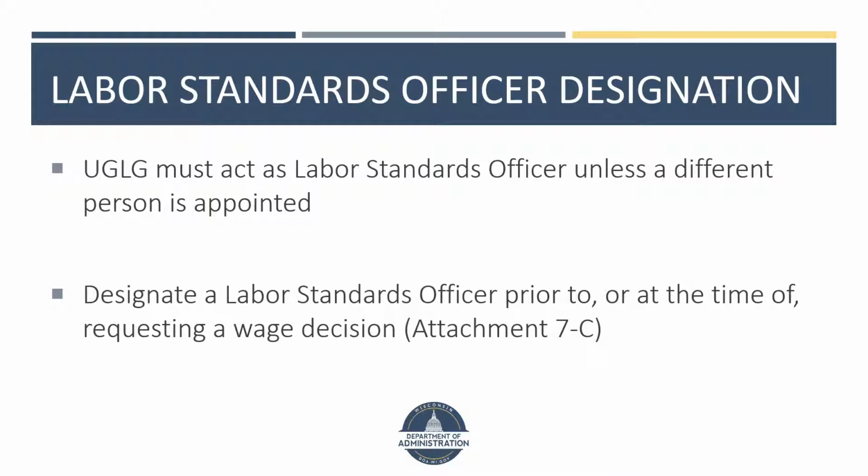An early step is designating your labor standards officer. The labor standards officer is responsible for all the items discussed on the previous slide: securing the federal wage determination, incorporation of bid packet requirements, ensuring contractor eligibility, inclusion of construction contract requirements, and holding an optional pre-construction conference, which all occur prior to construction, as well as compliance monitoring and compliance enforcement, which occur during the construction phase.